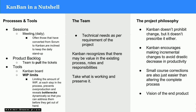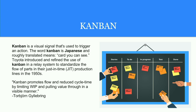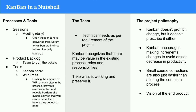Kanban in a nutshell: similar to Scrum, you can have daily meetings. For those converting from Scrum, go for it. You have a product backlog, and stories are there that you can pull from. The WIP limit really works well — we can limit things and ensure that items are first finished before picking up others. Teams are technical and used as needed. Kanban is extensively used for support projects in the Drupal ecosystem.